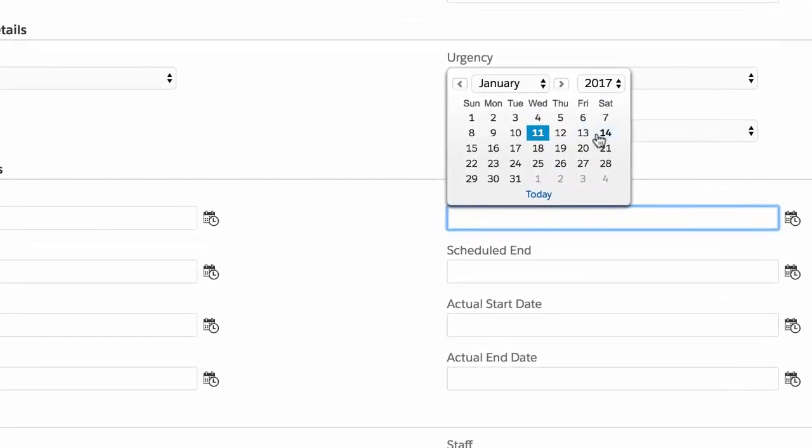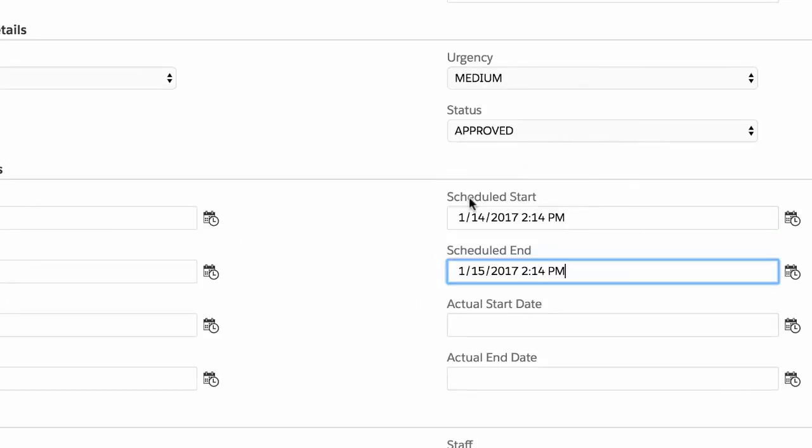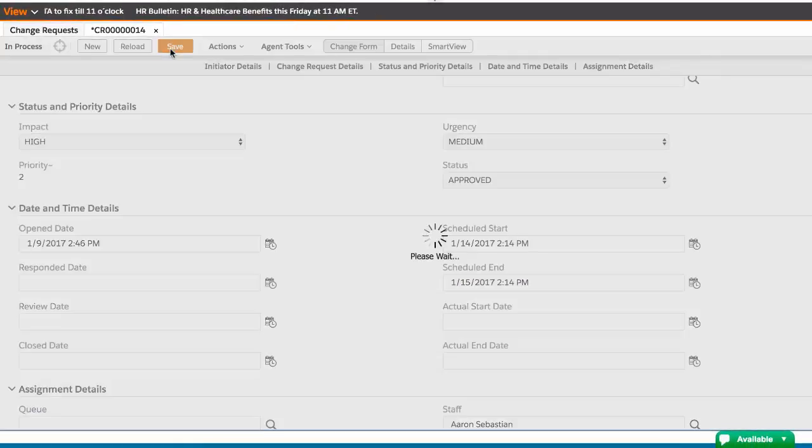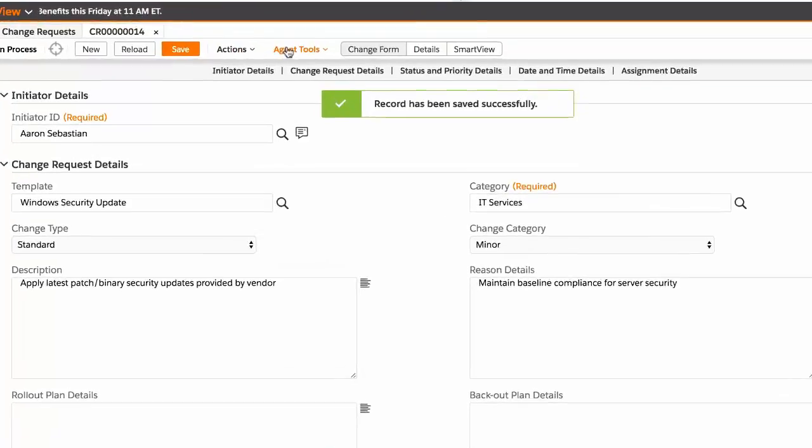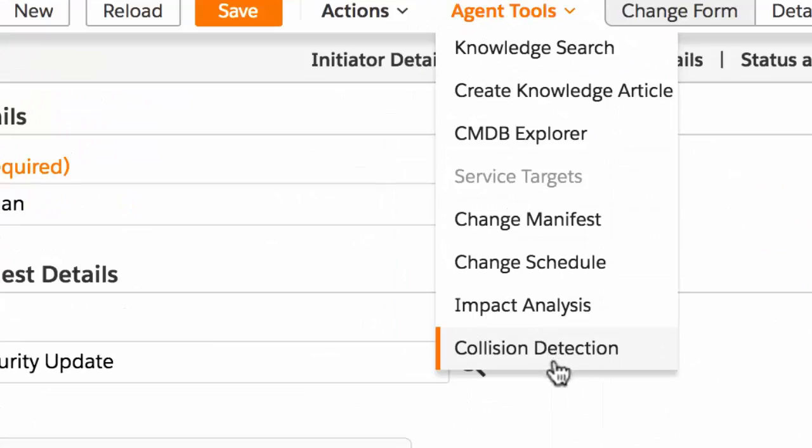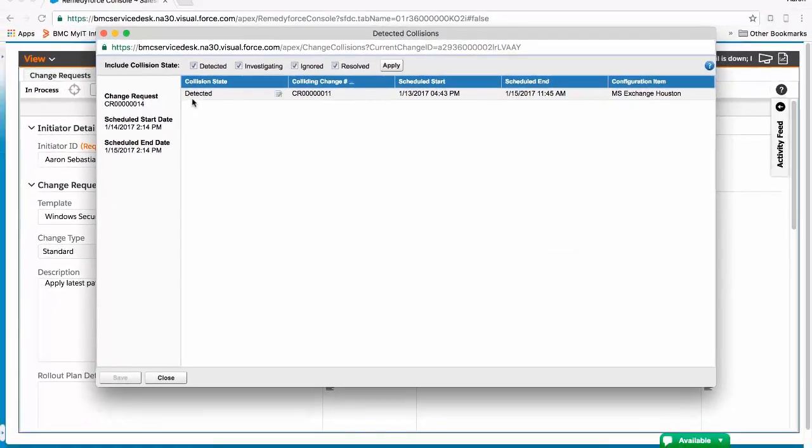When scheduling change start and end times, RemedyForce Change Management will provide any warnings of potential collisions. The requester can review such collisions in the collision table and remediate by rescheduling.